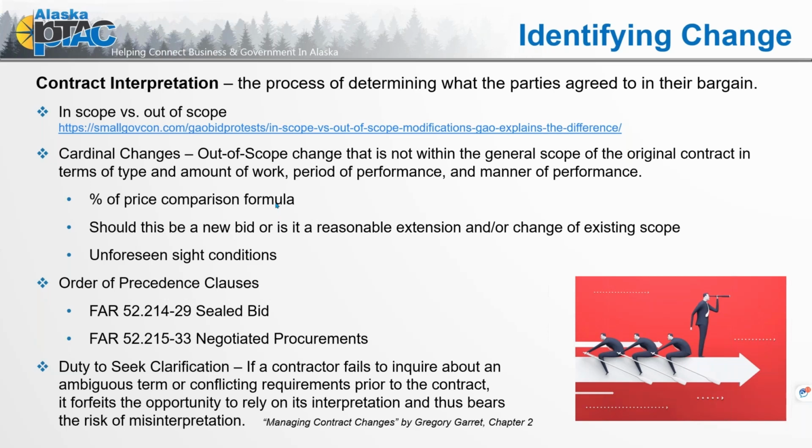Or if I say, hey, same area, it's adjacent, but then if I come back and say I have a second building or another floor where we have a distinct area, and I want to add an additional 600 square feet of painting, now we're looking at that. Is that a cardinal change? Is it significant enough that it could be bid separately?